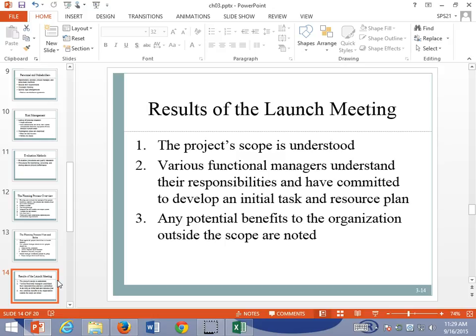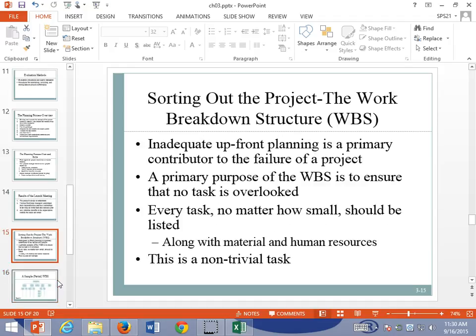One of the issues with almost any project is something called scope creep. In other words, the scope of that project starts to creep up a little bit. Think about our Curve project. While that construction company's there, why don't we have them pour some more sidewalks in front of the TJ Majors? It's not part of the original scope, but now we're expanding. It's creeping up. So what's going to happen to our timeline if we allow that scope to creep? On those triple constraints, we're now violating them because we're adding items that are going to increase costs, and most importantly, in a lot of cases, we're affecting time.